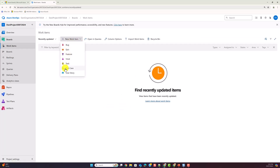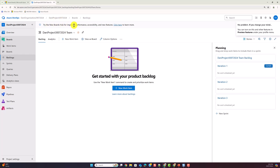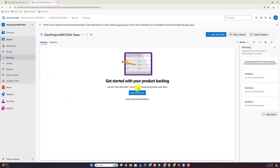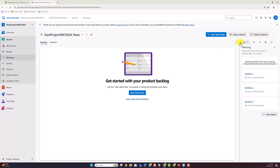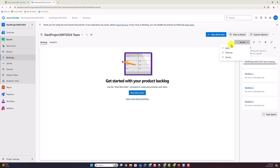I usually create work item types directly from the backlog, so let me jump to the product backlog. I recommend switching on the improved new boards features — go to your user settings, Preview Features, and turn on 'New Boards.' From there I can create new work items. By default it will create a user story. I also like to toggle on Epics visibility in the top right, because epics are not switched on by default — so switch it on if you want to use epics.